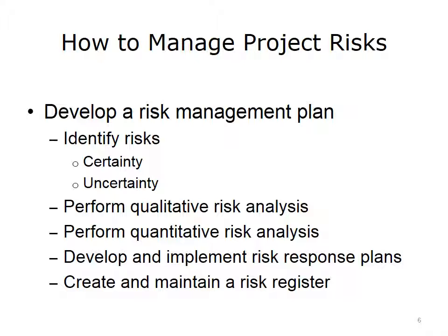Once you've used these analyses to pinpoint the high-priority risks, you would develop a plan to continuously monitor these risks. Many low-priority risks are also monitored because, if conditions change, these risks could shift into high-priority risks that impact project objectives. Identify and track new risks as they arise and implement risk response plans during your project's progress. As you continue through this identification and assessment process, you will be documenting each step in your risk register. As a risk is pinpointed, enter it into the register. You will update this entry after performing the risk analyses and again after developing the risk response strategies. If changes to the circumstances of the risk arise, enter those into the register as well.